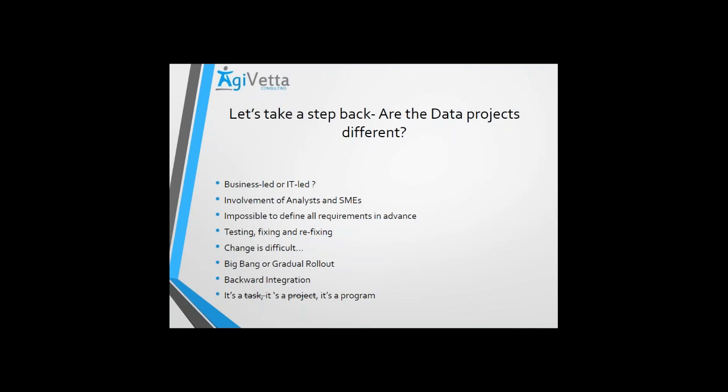The second part, which is easier in other projects and different in data projects: in a typical IT project, the analysts, the SMEs, the architects may come at the start. They may say, okay, this is how the design and architecture looks like, and then the development team takes over. They develop according to those specifications and requirements, and then you simply deliver the product or the solution. But when it comes to data-based projects, analysts and SMEs are continuously required, sometimes to check the sanity of the data, sometimes to check the design of the warehouse, sometimes to change the parameters as might be required. So their involvement is way deeper, way more continuous than in your normal IT projects.